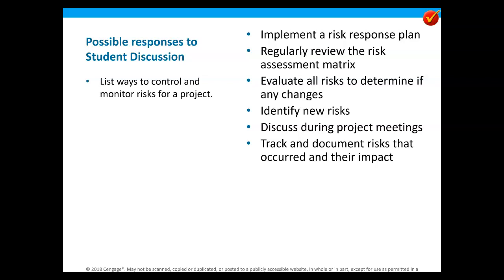Has something changed? So if our outdoor wedding was originally planned for May, but now COVID has moved it to August, does that change the risk for rain? Yeah. So we discuss things. We don't hide them. We discuss them in project management meetings and look at those new risks. Maybe some risks have walked off and we don't need to worry about them anymore, whereas we have new risks that we need to add.